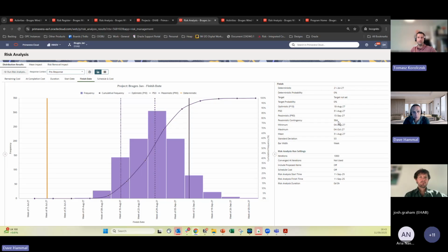So you need to do it either in a calendar way or add them as probabilistic risks. Just adding padding to activities, as you called it, would be a terrible approach